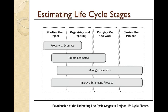Let's understand the estimation life cycle stages. When we talk about project estimation, it's not just the creation of estimate phase. There are four phases involved. At the start of the project, before we begin the estimation process, we prepare for the estimate. In this phase, we gather all the data about the project, create some of the work breakdown structure, identify the estimation approach, and gather historical data on which we will base the estimate.